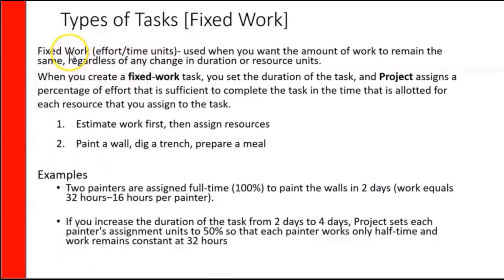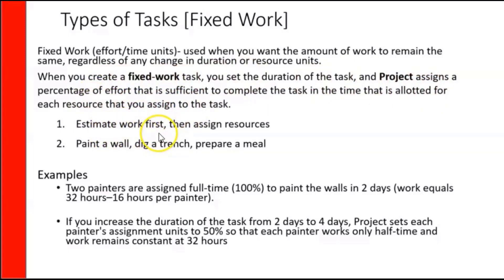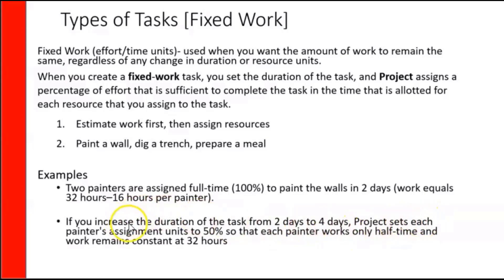With fixed work, the work remains constant. When you create a fixed work task, you set the duration of the task and project assigns a percentage of effort sufficient to complete the task in the time allotted for each resource assigned. So you should normally estimate work first and then assign resources. For instance, you have two painters assigned full time to paint the walls in two days — work equals 32 hours, 16 hours per painter. If you increase the duration from two days to four days, project sets each painter's assignment units to 50% so each painter works only half time, and the work remains constant at 32 hours.